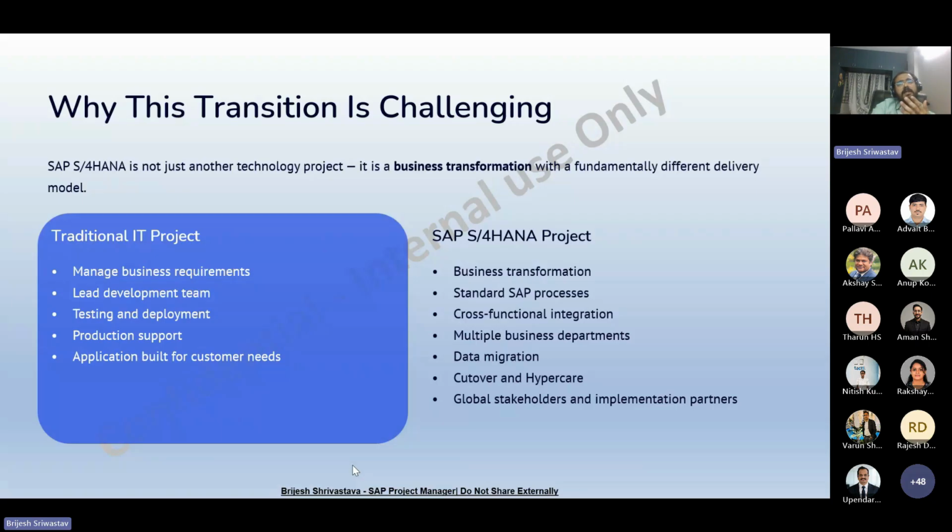Before moving to production, we need to validate everything, take sign-off, and make sure all compliance documents are in place. Then we can plan for go-live, because there is gate-wise approval, SG1, SG2, SG3, SG4. These are the gate-wise approvals in SAP.